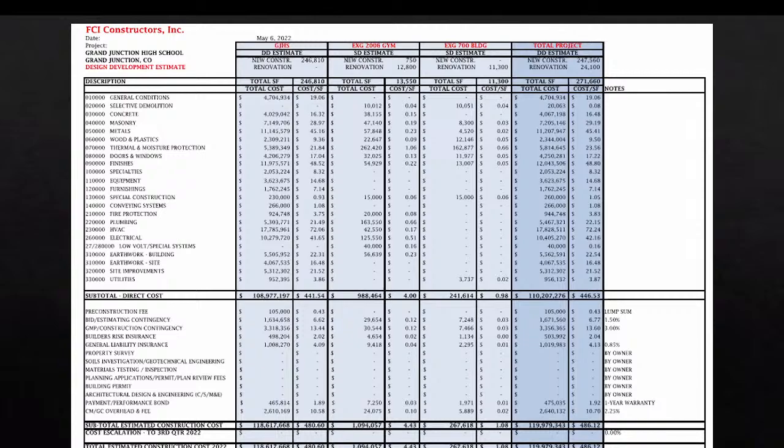On board immediately, because there are a lot of things going on in the market right now that we have to manage. For instance, Trane Equipment, who we opened up our specs to, and we got numbers from Trane, who the district is very familiar with, and Long, right. Daikin, right? And they were teamed with Long Controls. So we had two numbers there. Trane was the low number on the equipment that they bid, and we had an apples to apples comparison. So we got a real good value with them.